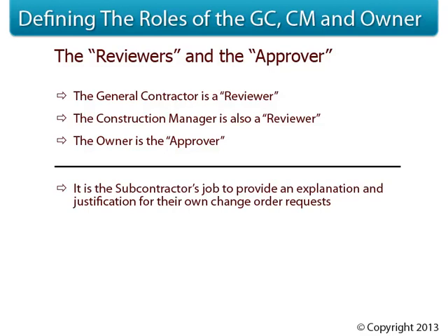It is the subcontractor's job to provide an explanation and justification for their own change order requests. This includes a written narrative of the issue and compiling all the backup documentation. It's the subcontractor's money, so the subcontractor has to do the work. Remember, to ensure there aren't any holdups in the change order processing, always prepare a change order request with the assumption that the owner knows nothing about the issue. Owners don't spend a lot of time on site, so for the smaller and less obscure issues, the owner may not even know about them until your change order request shows up.